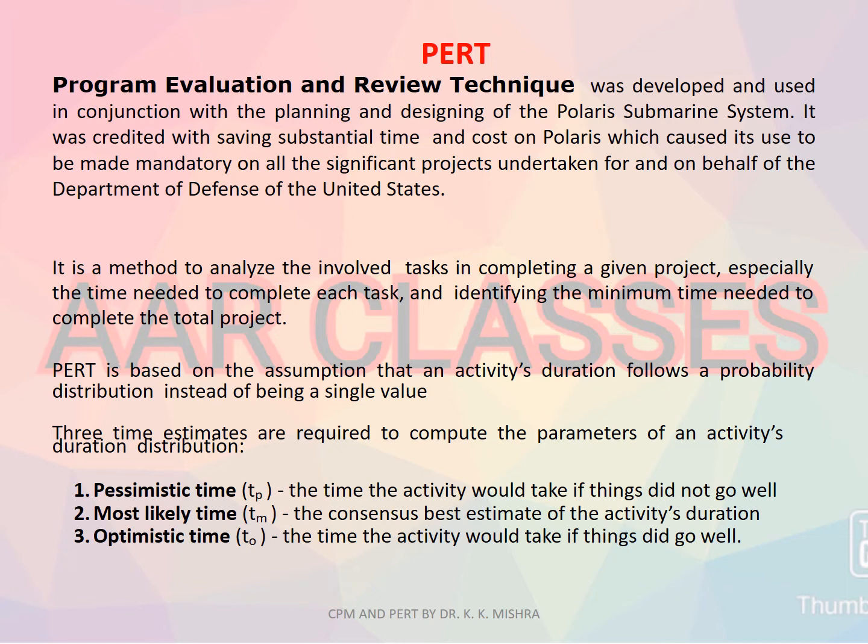PERT is based on the assumption that an activity's duration follows a probability distribution instead of being a single value. Here, in cases of projects where the completion time of an activity is not certain, normally we apply PERT. Three types of timings are observed here.